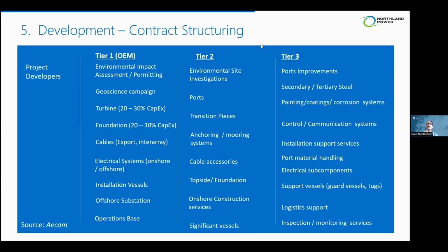Typically, as someone who does project finance, we aim to have 10 to 15 contracts. Our lenders also like to understand who is responsible for a specific deliverable and want to know that they have the credit security behind them to deliver. But if there's one takeaway from this concept of contract structuring, it's that there's two broad buckets: one, balance sheet finance, and two, project finance.